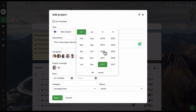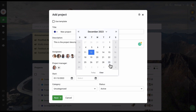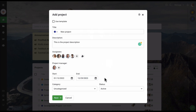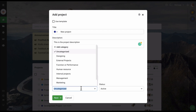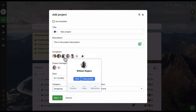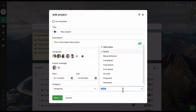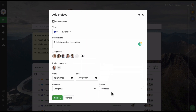Let me give an end date for next year. You can also select a category and a status to manage your project. Project categories can be used to group your projects by different clients, teams, or departments, and they are completely customizable. Similarly, the project status is also completely customizable and can be used to define the different steps that your project goes through. Let's select a project category and a project status.